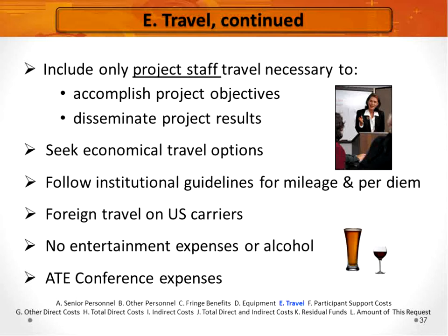So if you're applying for an ATE grant in October 2015 and it's funded, you would be expected to attend the 2016 ATE conference. AACC actually hosts the conference and provides some assistance by covering the cost of registration and 2 nights lodging for 2 people per ATE project or center. So you'd want to consider budgeting airfare and other travel costs to and from Washington, D.C. for at least 2 of your team members to attend.